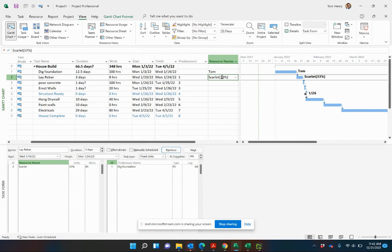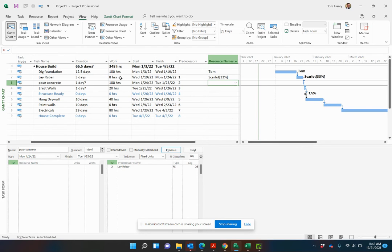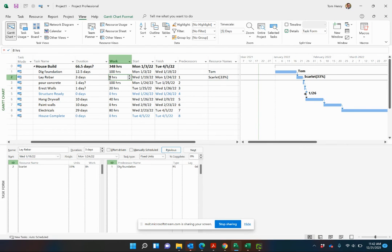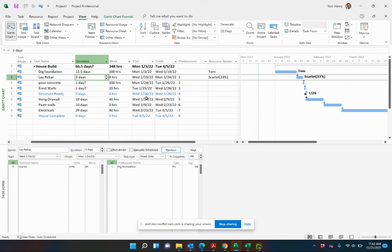And you can see these calculations taking place rather than having a three day task. And by default, it assigned that resource at 100% units. Therefore, it would have been 24 hours work as opposed to three. But because we've estimated the work, we've estimated the duration. Microsoft project calculates the unit for us for Skylar.